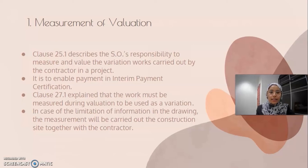In Clause 27.1, it is explained that the work must be measured during the valuation to be used as a variation. In case of limitation of information in drawings, the measurement will be carried out at the construction site together with the contractor. If the contractor is not present, the valuation is still valid.